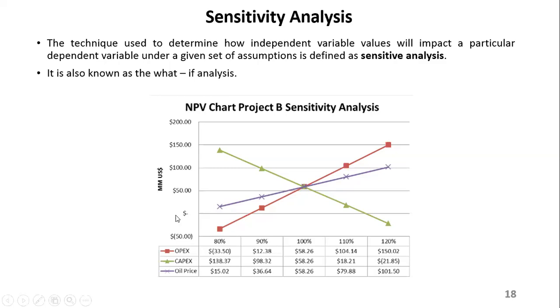I think it will depend on the firm. The firm can decide and say the NPV that we want should be, let's say, 50,000 million here. So you can see that all these points below that 50,000, all those changes, the project can actually handle them.